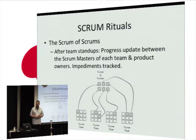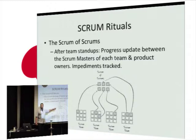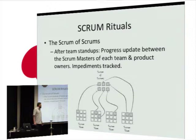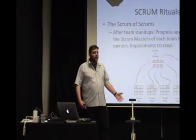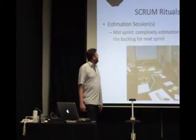The next ritual is the Scrum of Scrums. At one point at Philips we had six or seven teams running concurrently. After all teams have done their morning stand-up, the Scrum Masters come together in a separate meeting and update each other and the product owner on impediments, team progress, and sprint forecast. An impediment is anything that takes more than 24 hours to fix or can't be resolved internally. It's the Scrum Master's responsibility to bring them into the Scrum of Scrums and remove them.